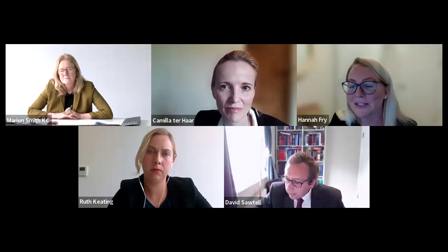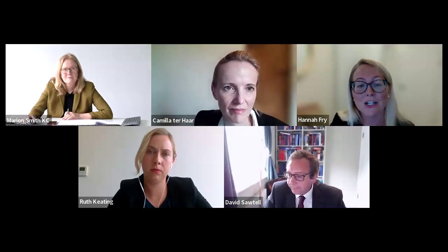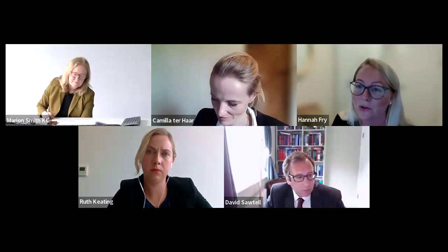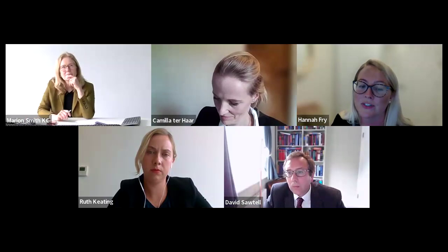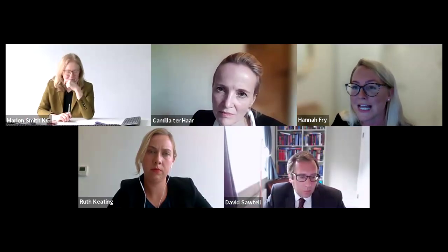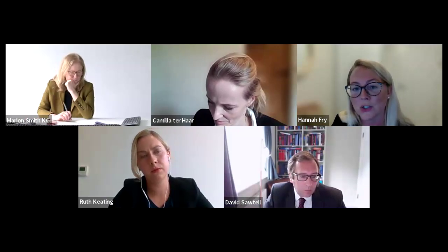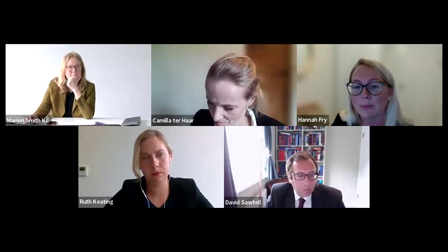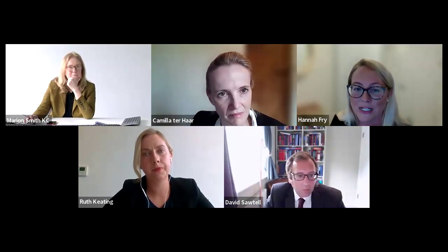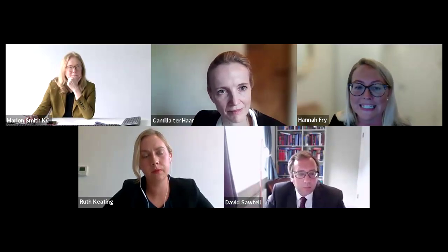Thank you, Marion. So under the JCT contracts, we know that the contractor and the employer both have a right to terminate the contract on the basis of insolvency of the other party under Section 8. What has changed is that the definition of insolvent under clause 8.1 has now been amended and expanded to reflect the wording of the Corporate Insolvency and Governance Act 2020, which I'm going to refer to as CIGA.